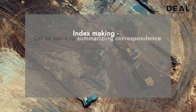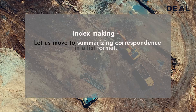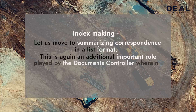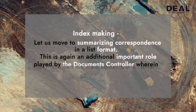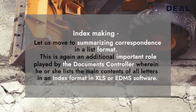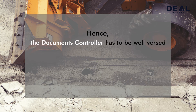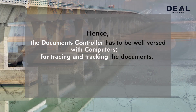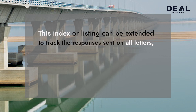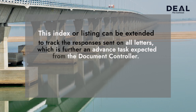Index making: Let us move to summarizing correspondence in a list format. This is again an additional important role played by the document controller wherein he or she lists the main contents of all letters in an index format in Excel or EDMS software. Hence, the document controller has to be well versed with computers for tracing and tracking documents. This index or listing can be extended to track the responses sent on all letters, which is a further advanced task expected from the document controller.